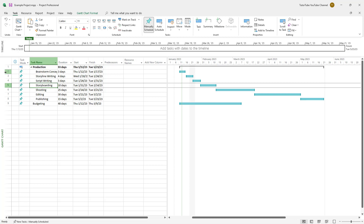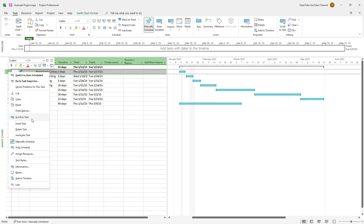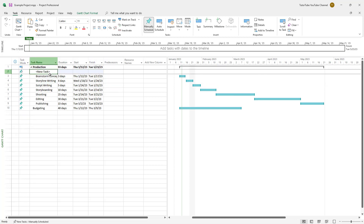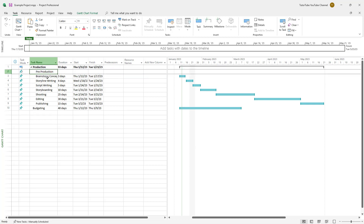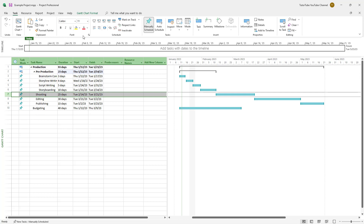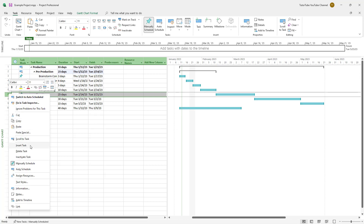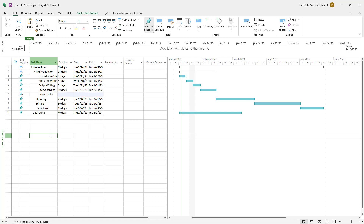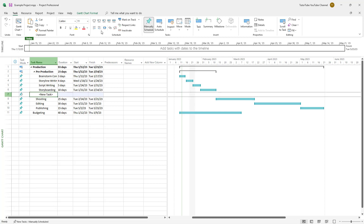You can divide tasks into further subtasks. I'll insert a task called 'Pre-Production'. Brainstorming concepts, storyboard writing, script writing, and storyline writing are all part of pre-production, so I'll indent them further and they become subtasks again.